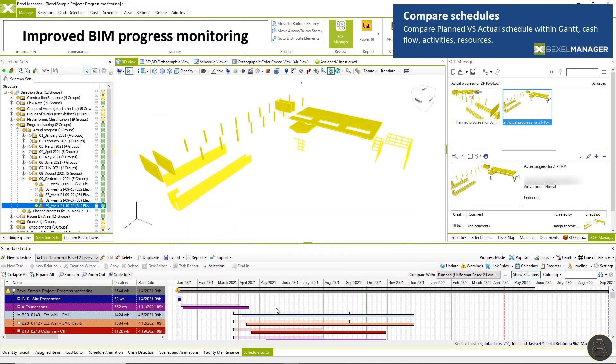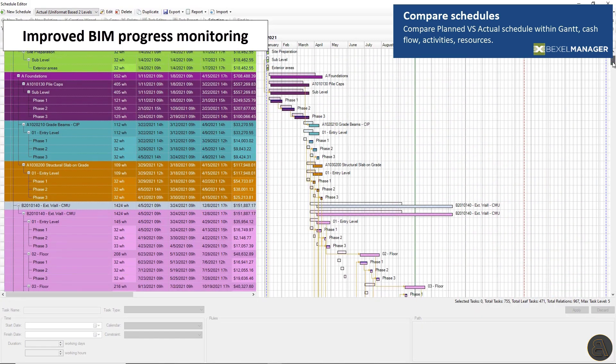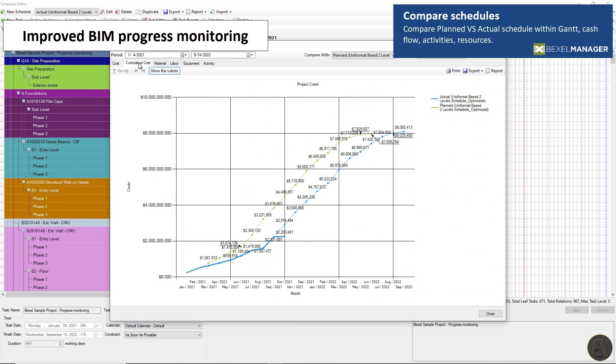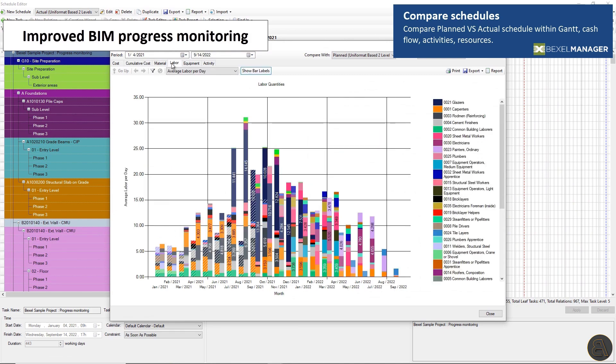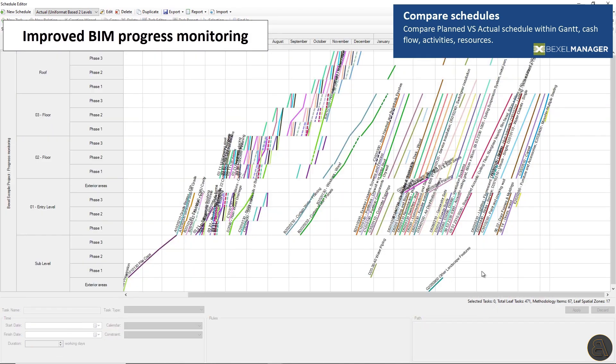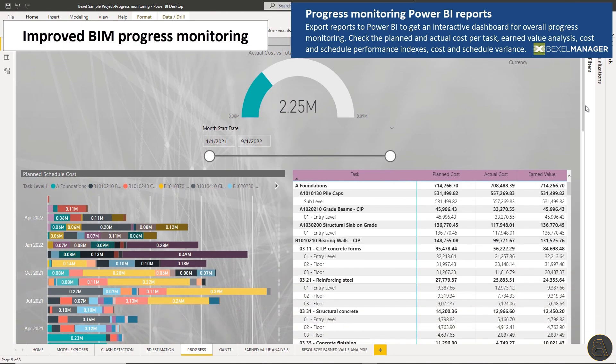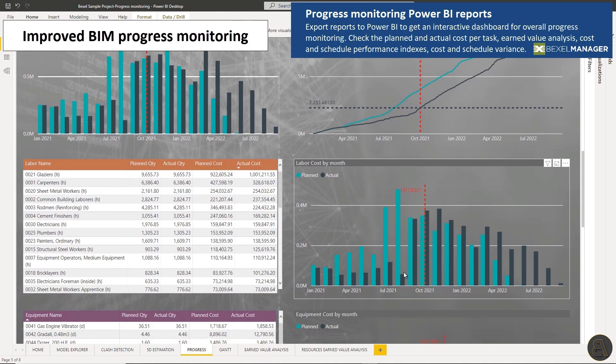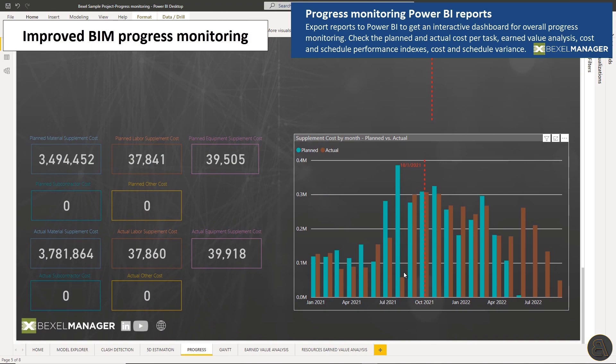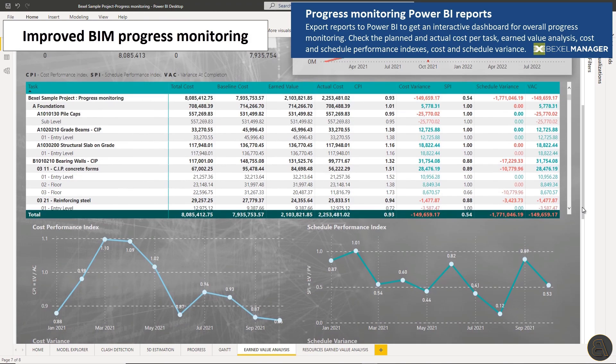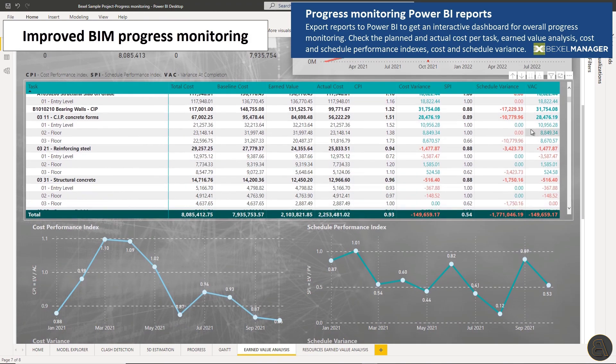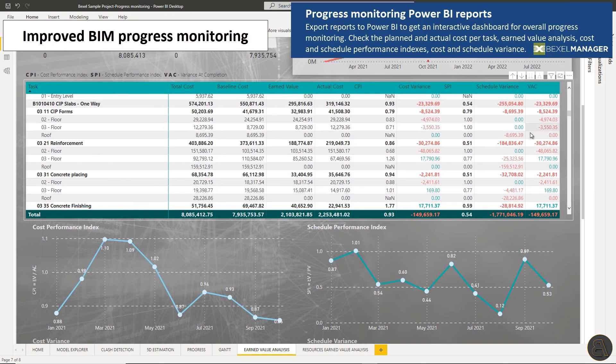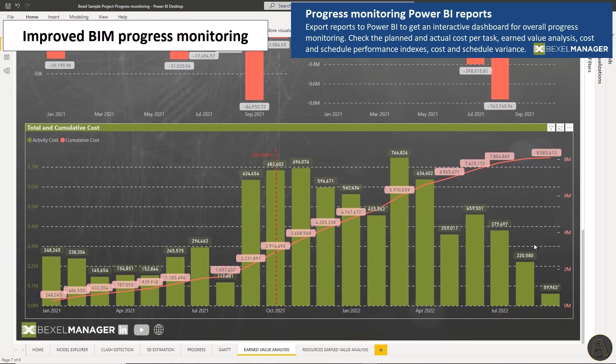Compare planned versus actual schedules, task reports, total costs, cumulative costs, activities, check line of balance. Export reports to Power BI to check the planned and actual cost per task, earned value analysis, cost and schedule performance indexes, cost and schedule variance and other analysis.